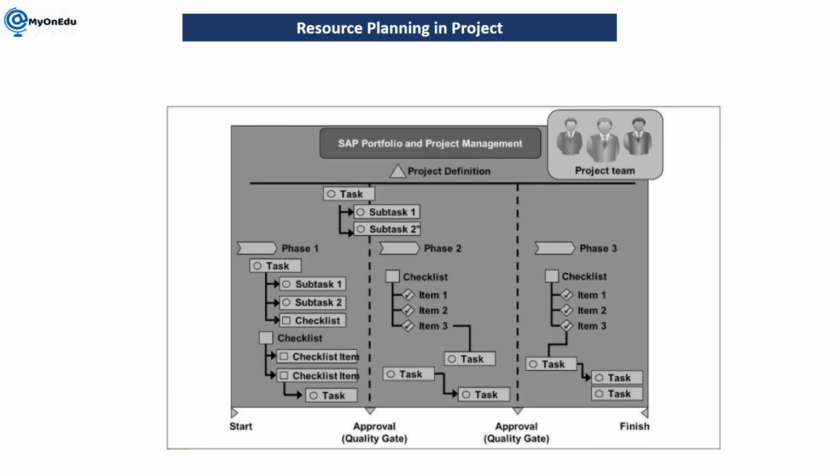Okay, here in SAP PPM, we also have the functionality of resource management. It is additional, but in my scenario, it's not required because it's a very elaborate area where we need to understand how you can do the staffing in the project, on what basis, how the project manager demands the resources, then it goes to the resource manager, then the resource manager finds them from the resource pool or from other data.